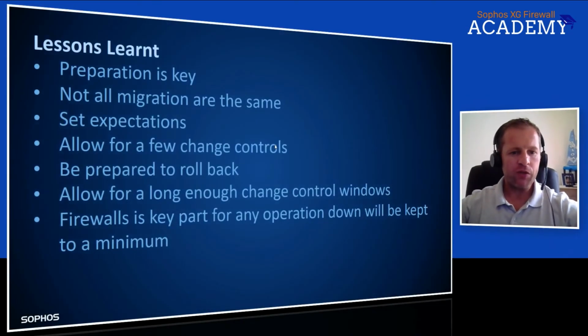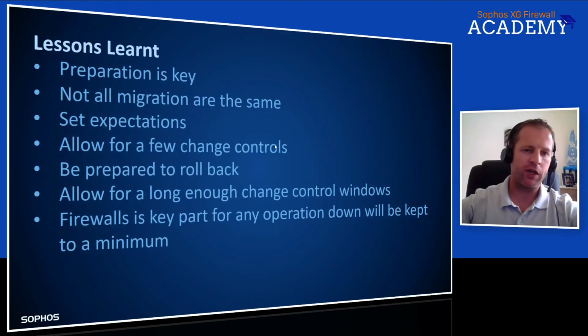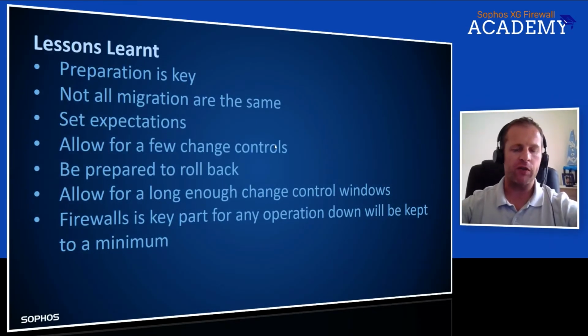Because if you do migrate them and you don't know which ones were in use and which ones were not, there could be underlying issues, and you'll be struggling with something that has never worked or hasn't even worked on the SG, and the migration tool actually migrated it. So some of the lessons learned when we moved this customer is that preparation is key, obviously. We had to prepare ourselves properly. We had to make sure that we have everything in place. We've learned quite a lesson with this.